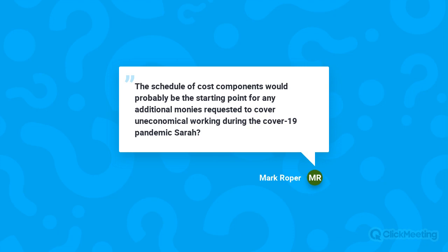It talks about basically contractor or subcontractor not being able to complete for reasons beyond anyone's control. So that's a compensation event. You might also be arguing that, if the client stopped you from working, that they've not allowed you access to site, on one of those compensation events.